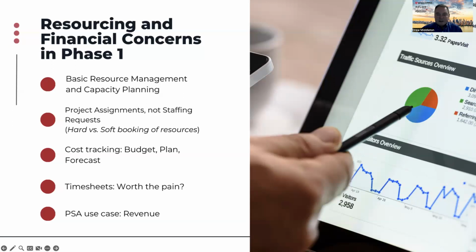The project managers can look at each of the work items and we can estimate a percent complete. Or we can ask our team members and say, help me out, where are we at with this? Or we can even use an aggregation. We can say, well, let's just go binary on each task in the work plan. It's either not active yet, it's active but not complete, or it's completed. And when we roll that up across maybe dozens or hundreds of tasks in the work plan, we'll get a directionally correct estimate of where we stand in our project.